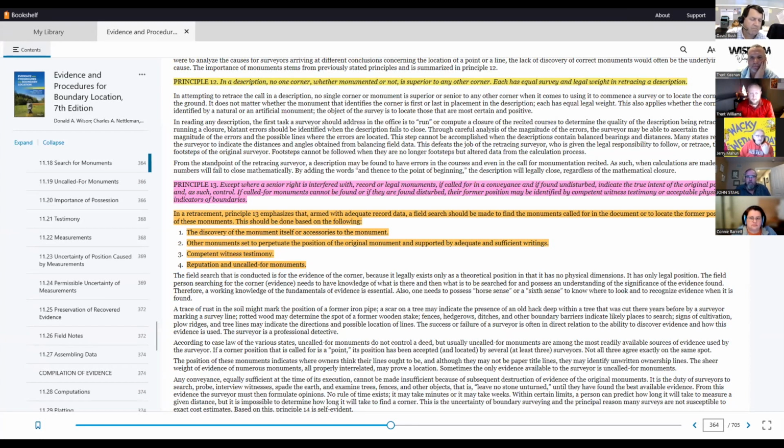See, in Wisconsin it's the responsibility of the surveyor. Anybody that's going to be doing the actual disturbance of this stuff, it's the surveyor's responsibility to notify all the respective parties that are going to be affected by that. So my question is where does the surveyor's responsibility stop and the neighbors' or the client's begin? So who does the actual conversing with the neighbors? Do you let your client talk to them first? Or do you actually tell them, because you're going to be affecting their boundaries also in the process?